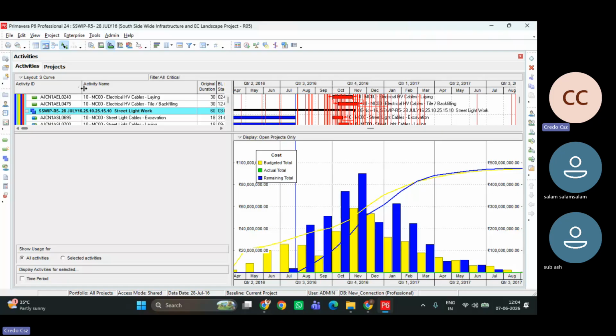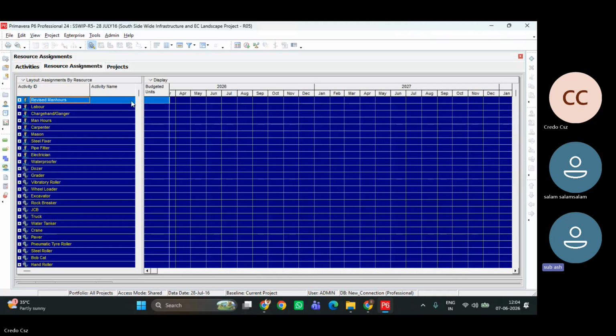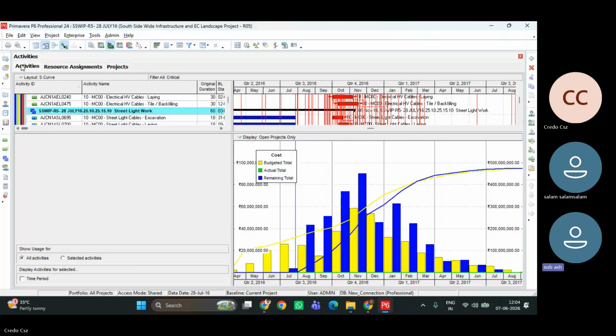But it's not just a resource histogram. Because we can't do a resource histogram if we use expenses, right? Both are not related. Resource histogram is based on resources, number of resources. But in expenses we are not going to touch these resources. When we are uploading the cost, we are using the expenses, but only through resources can we add labors.